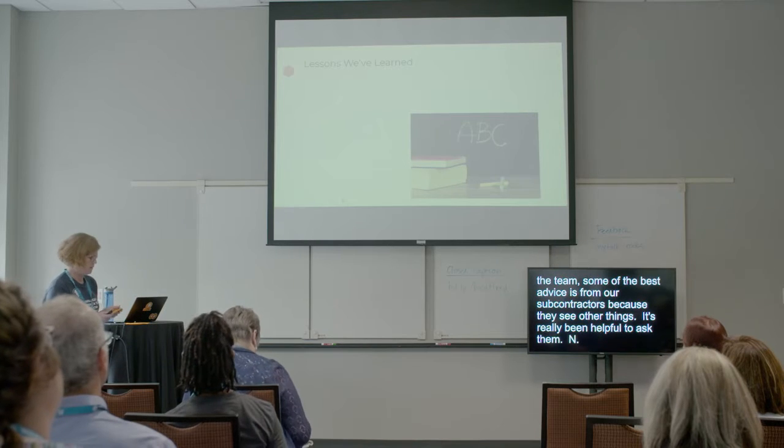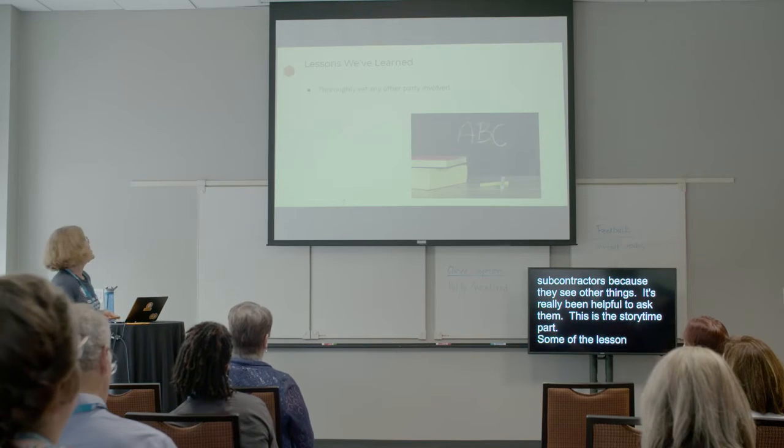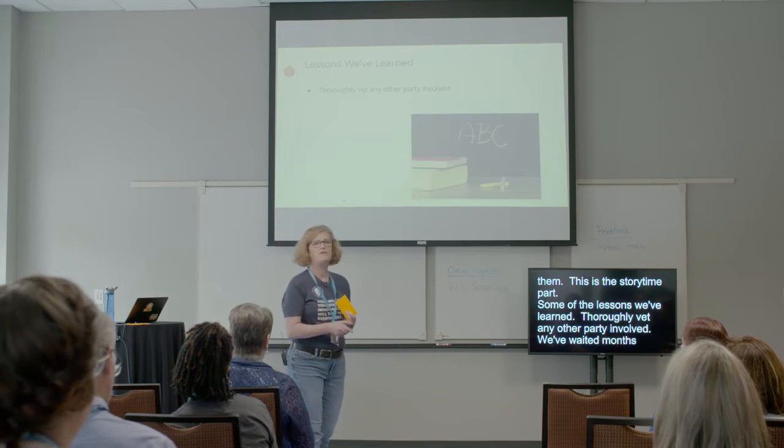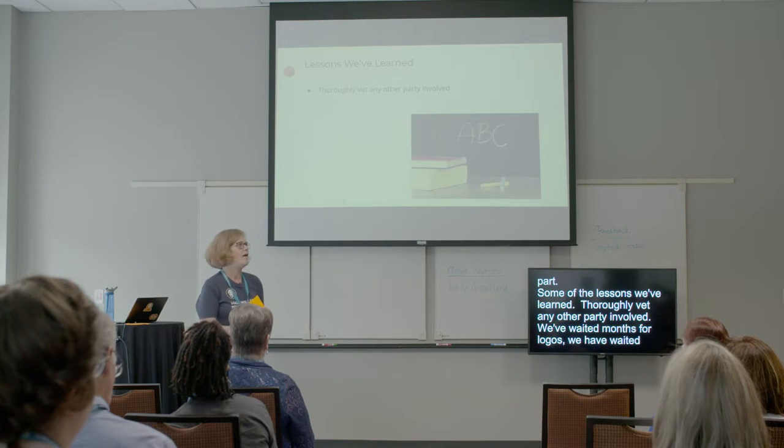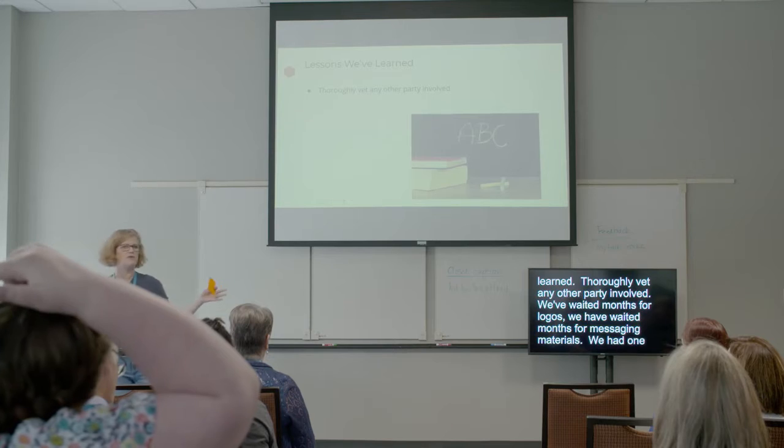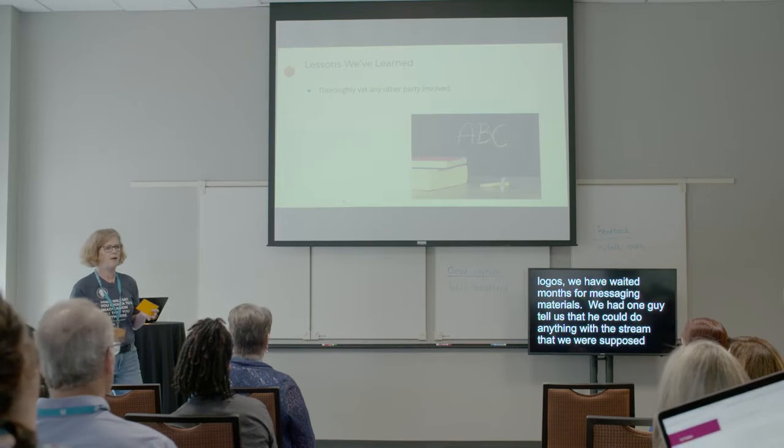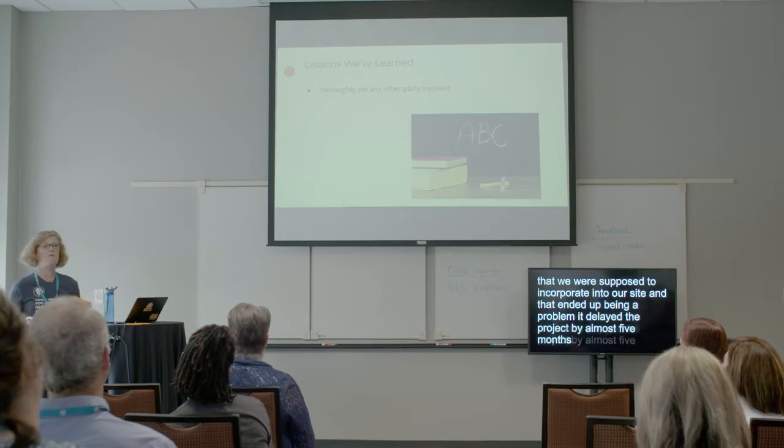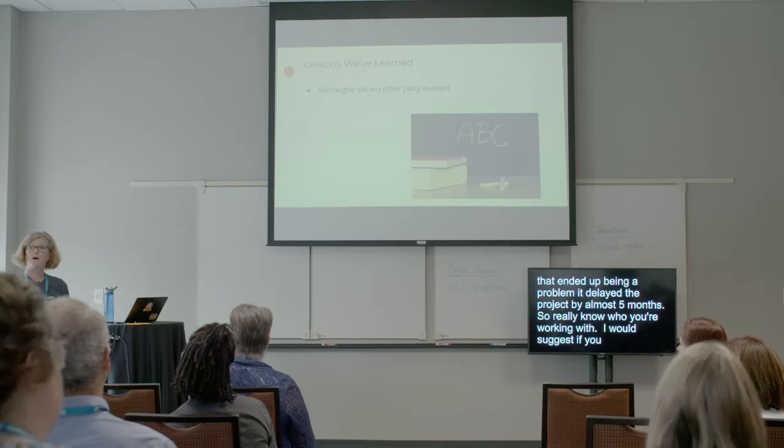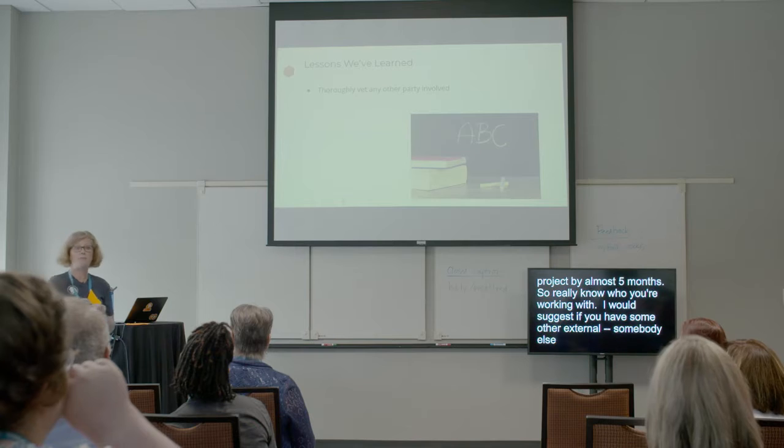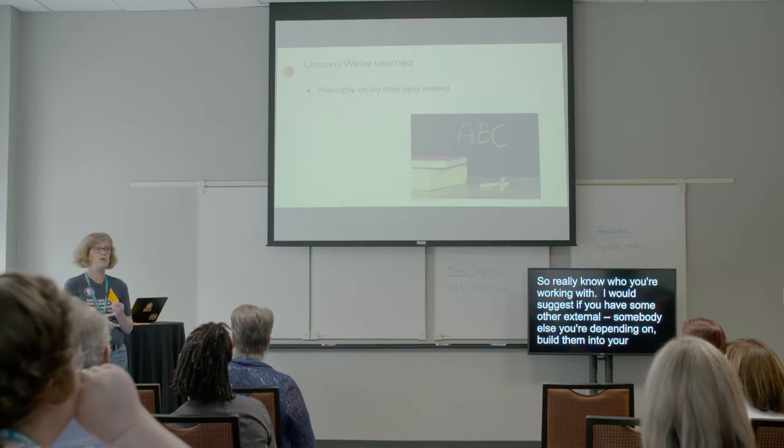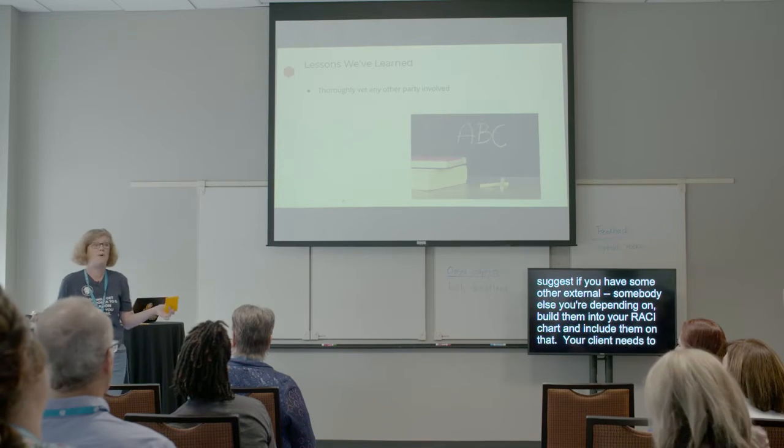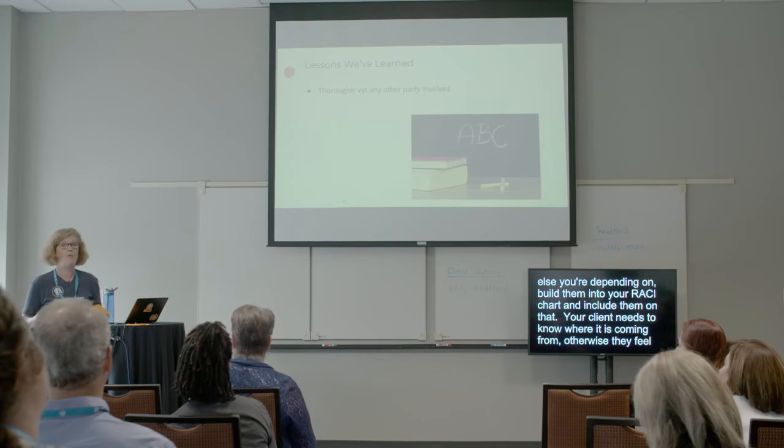So this is the story time part. Some of the lessons we've learned. Thoroughly vet any other party involved. We've waited months for logos. We have waited months for marketing messaging materials. We had one guy tell us that he could do anything with the stream that was supposed to incorporate into our site. And that ended up really being a problem. It delayed the project by almost five months. So really know who you're working with. I would suggest if you have some other external, that somebody else you're depending on, build them into your RACI chart and include them in that. Because your client needs to know, because they're the ones probably paying for the other company. They need to know where it's coming from. Otherwise, they just feel like they're being tossed between two people. And you don't want them to be that way.